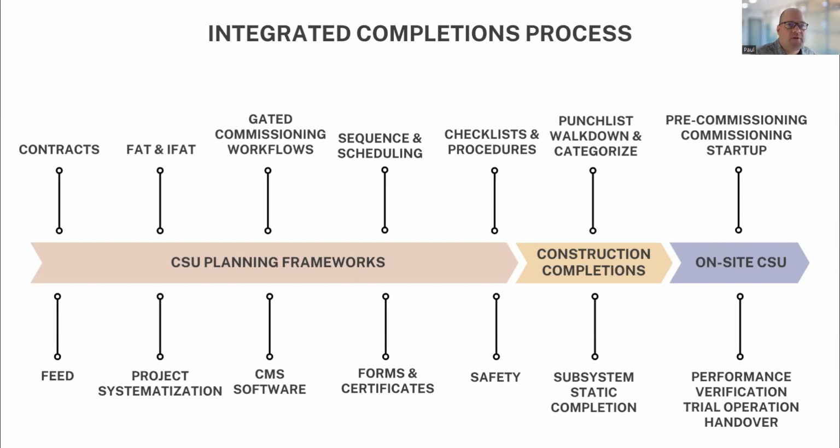As we're going through a lot of our development here and planning, we'll be able to develop our commissioning sequence, and then with dates and durations, figure out our commissioning schedule. All of this gets loaded into our CMS software as well to plan the sequence of what's required for commissioning and give everybody visibility and clarity on that sequence within our commissioning software, so everybody knows how their role contributes to successful commissioning at the end of the project.